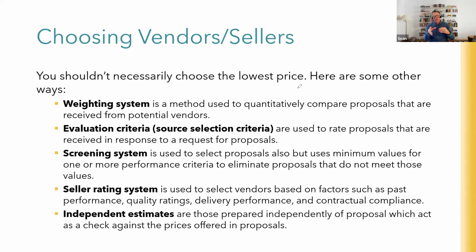So in this case, the seller may spot that the plans you've issued have some big gray areas in them. And what they'll do is bid low to get the job, because they know that when you clarify those things, they're going to say, oh, that's a change to the contract. And so they might be running no profit at all on the main part of the job, but 300% profit on all those variations that you're then obliged to ask for. So watch out for that as well.